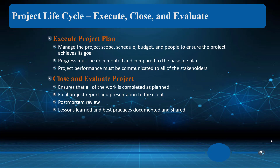How are we doing? What's going on? I want to communicate and make sure that my team agrees. Execute project plan — how we do the work, when we're going to do the work. Progress must be documented compared to the baseline plan. We have this plan, and we want to start a subset of that document: we said this would be done on Tuesday, but let's note it was done on Wednesday, and that put us one man-day behind schedule. Why did that happen?